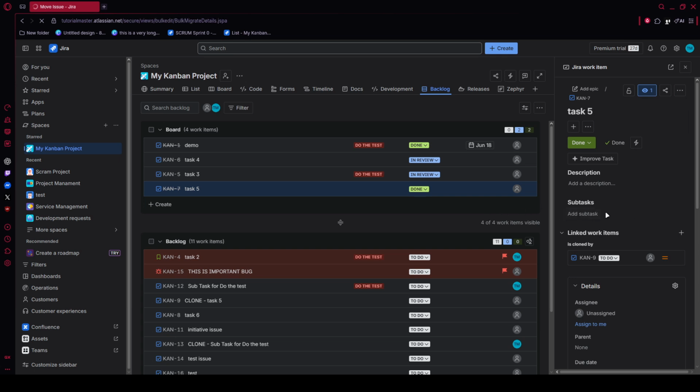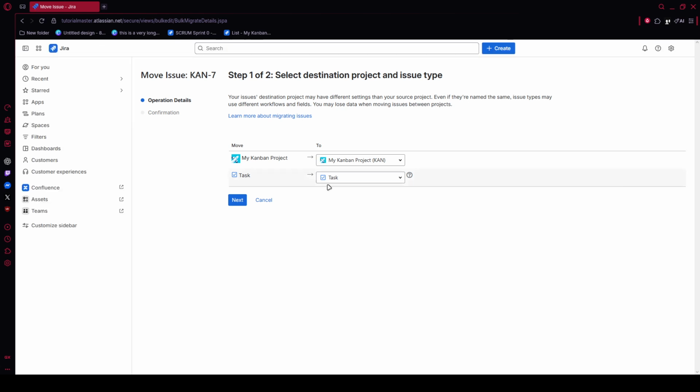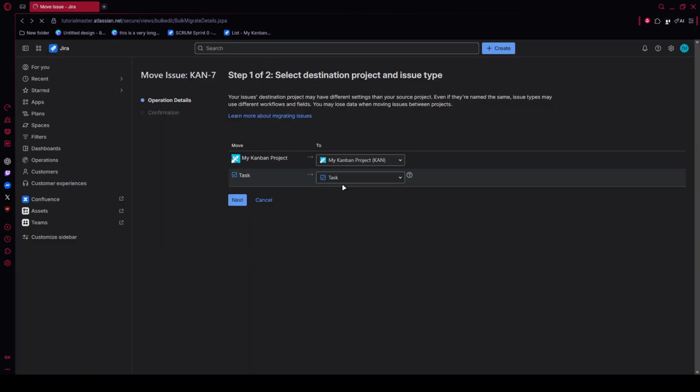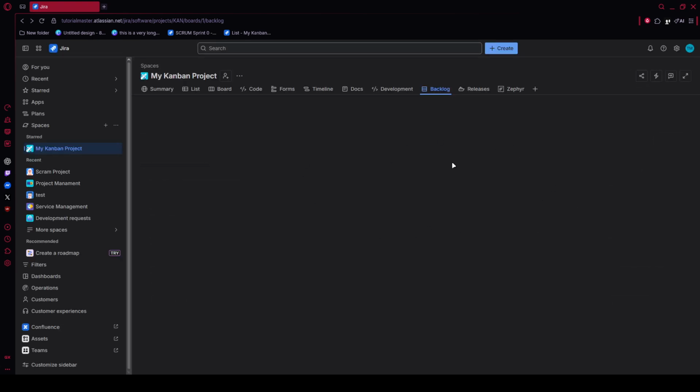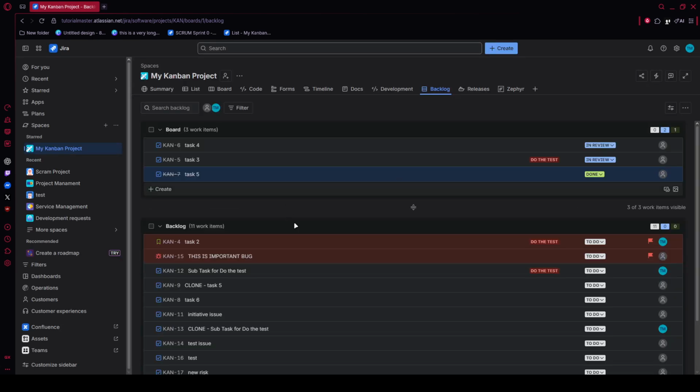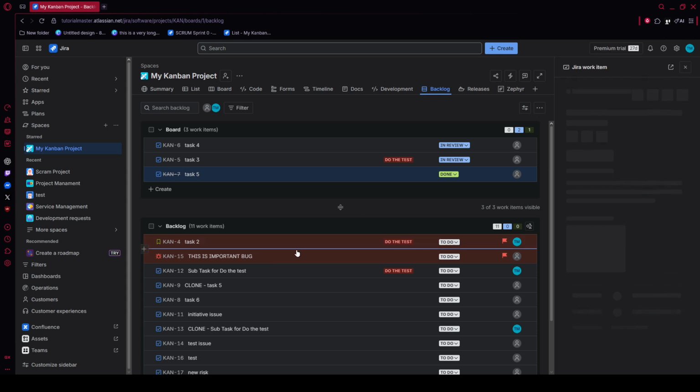There's also a faster shortcut for quick triage. Right-click the issue card, and if your Jira setup supports it, choose Move to Backlog from the context menu. That sends the item back without needing to drag it across the page.